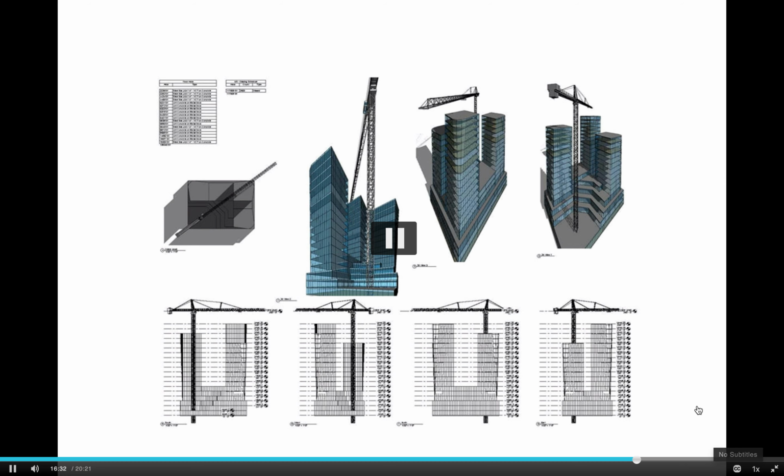So all of that is pre-planned, and there's an incredible amount of planning that goes on when you have a tall building with thousands of structural steel members. So that all ties back into your logistics. These elements of your project, the members of the structural steel, have to arrive when they're needed, at the time they're needed, so that they can be picked.